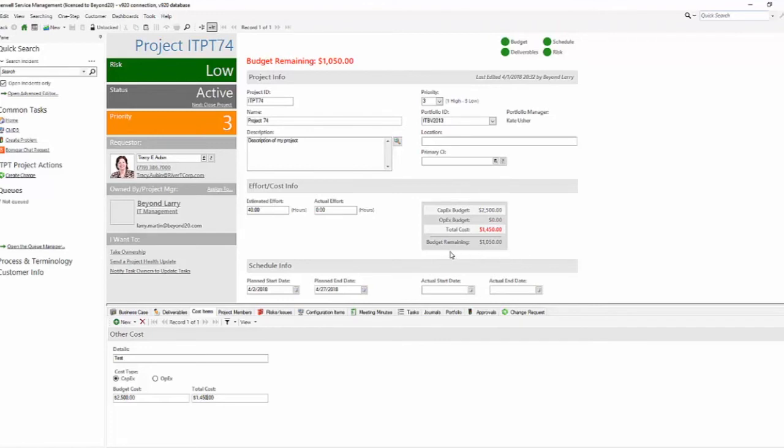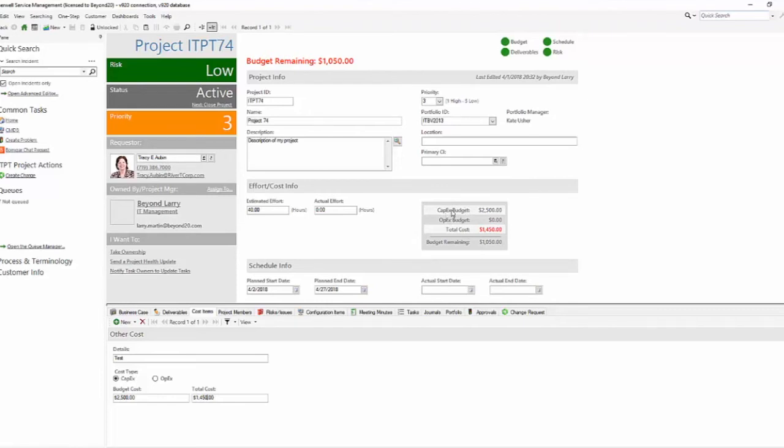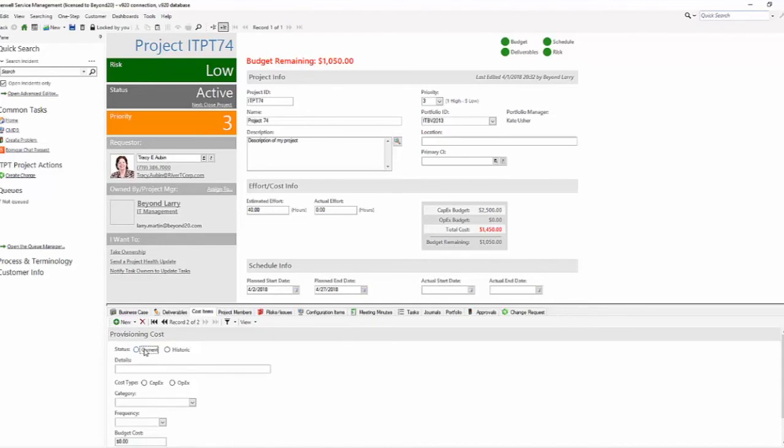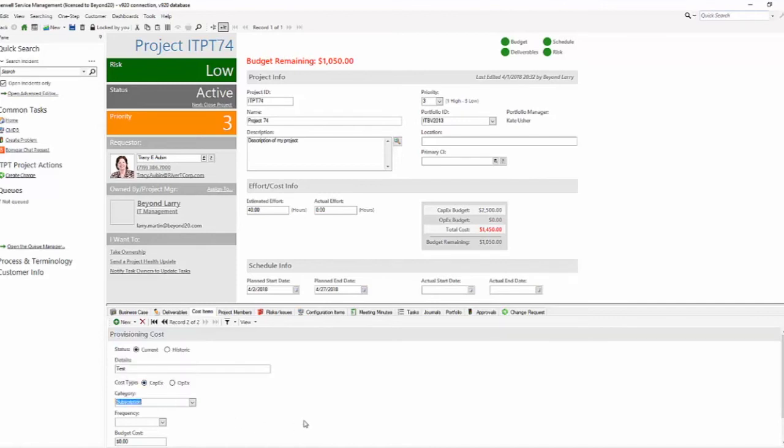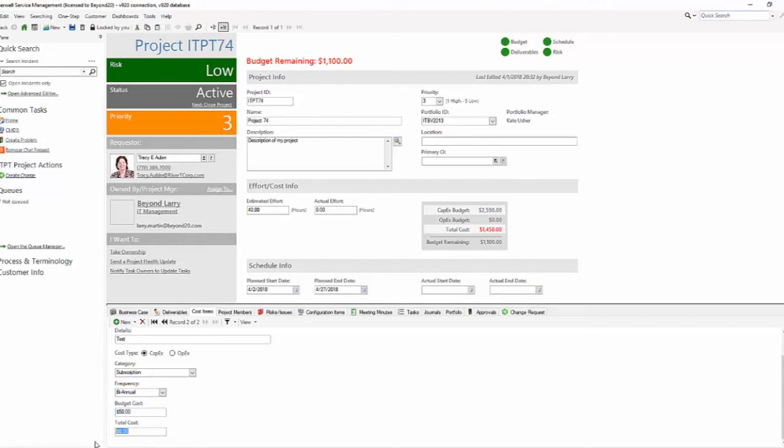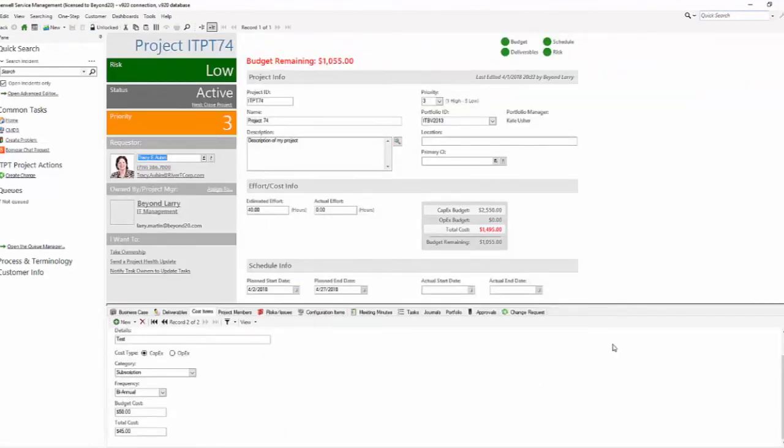We still have $1,050 in our capital expense budget or our overall project budget. I would consider enhancing this a little bit where you can show your capital budget, your capital expenses, your operational budget, and then your operational expenses. So you can get a clearer picture of your total expenses and budget items rather than having to come here and look at them one by one. As I add new items, let's add a provisioning and it's going to be a current provisioning. We're still going to use capital expense. Now we can put a category. It's a subscription. What's our frequency? Let's leave it biannual. We're going to put $50 as our budget and our total cost is going to be $45. Now that we've saved that, our capital budget has gone up now.